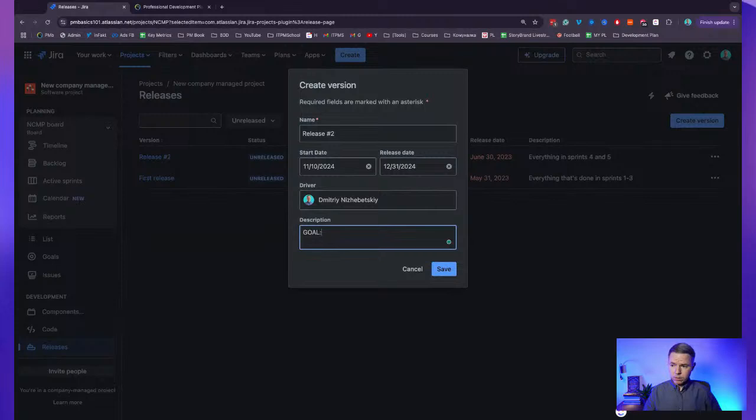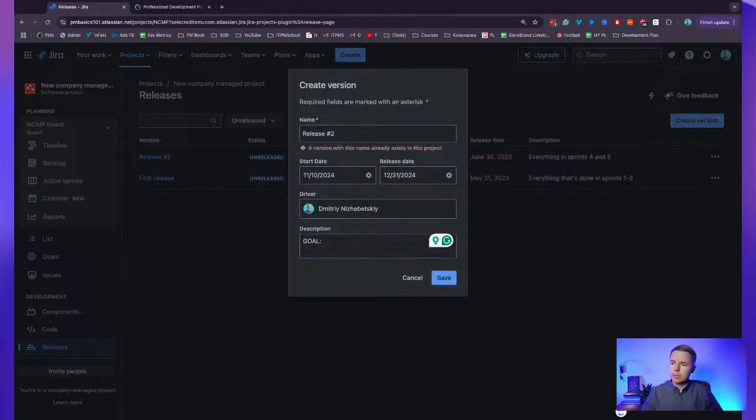So you can organize all of that into projects in this simple way and put specific goals here. And this goal, if you communicate it properly to your customers, your product owners, you can use it as a project charter idea or concept that will say, okay, if a user story or defect doesn't support the project goal here, then we shouldn't take it for this release. Instead, let's plan out the next release with a different goal and start filling out that release with additional features.